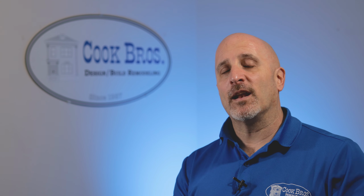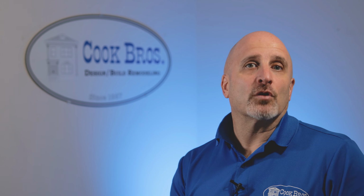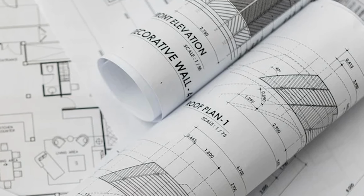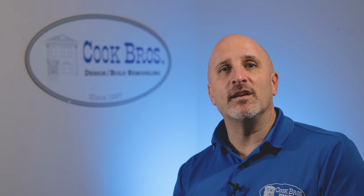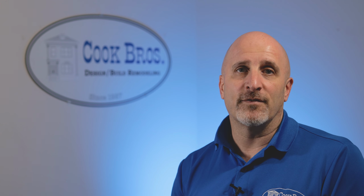We'll also hold back some money for you at the end for 2 final payments for what we call retainage. That way you guys have some money to hold back to ensure that we're going to get in there and get finished up with your project on time. Once we've signed that contract, we're going to then develop more detailed drawings that we need to pull county permits. Cook Brothers handles all of those details, so you'll never have to deal with the county inspectors, with the plan reviewers, or any of that. Cook Brothers handles all that from start to finish for you.